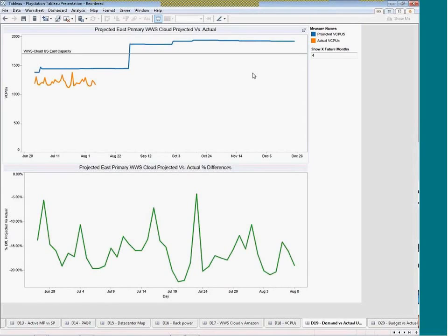So we have this plan for how many servers we plan on using, because we need to do capacity management. And we also have our actuals. Of course, we keep track of how many servers we are running every month and all the instances that we are running each month. So that allows us to do this. We do our how good were our projections versus the actual. Here you can see we're doing pretty good. At the start, we had some learning to do, and our projections weren't as accurate, but we're getting pretty good at doing this now. Each year and each quarter we take a look at our projections, we update them, and we get better.